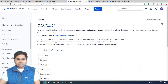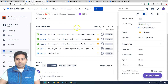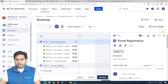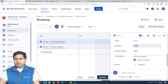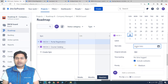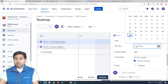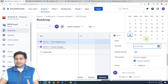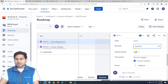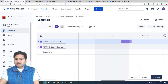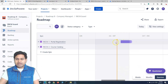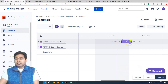After adding the start date to the issue screen, go back, refresh the roadmap page, open the epic again, and you'll see the start date field is now available. For example, if I plan to start this epic on the 8th of September, I select that date and click elsewhere to save. The epic details update accordingly on the roadmap, though it shows 'no due date' since that hasn't been set yet.